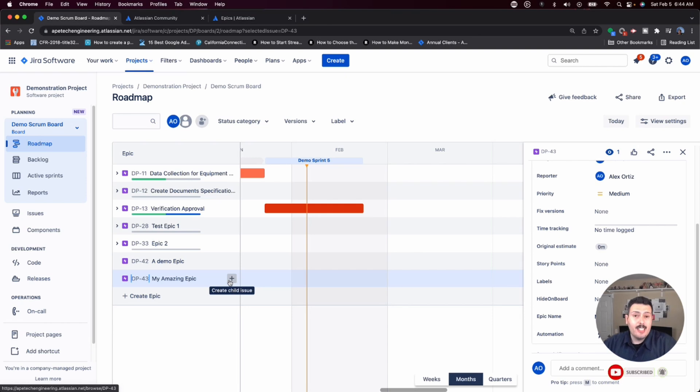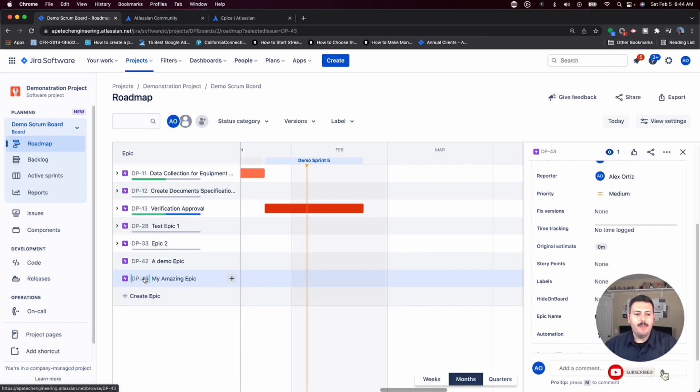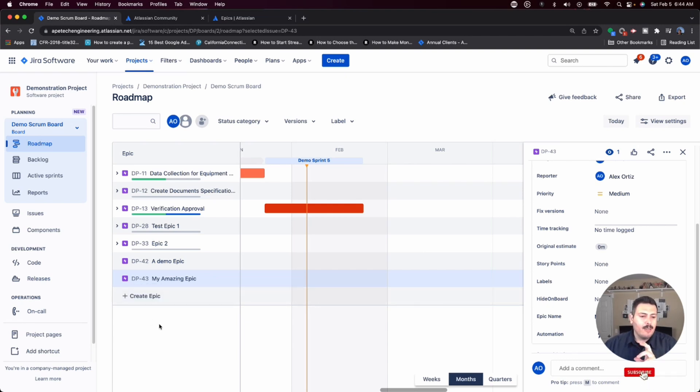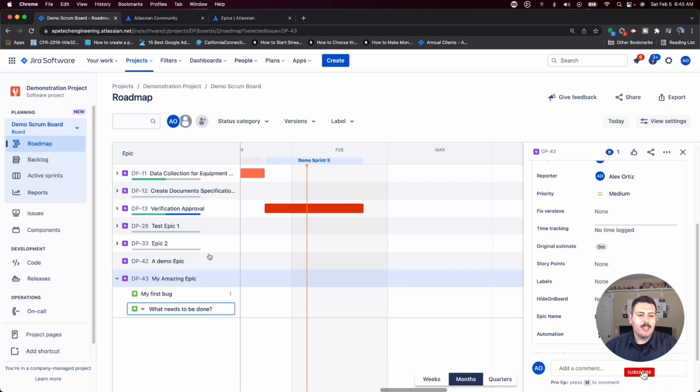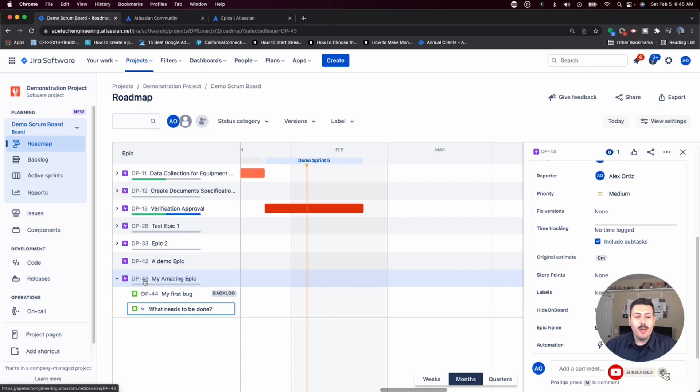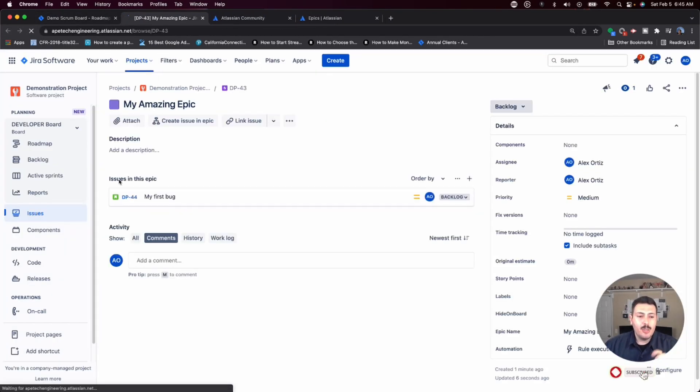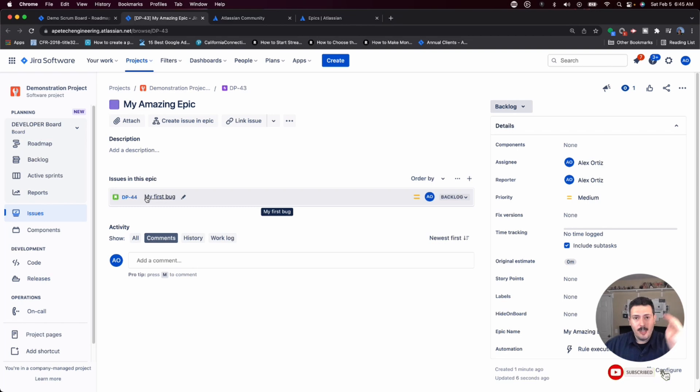And while you're here, we're going to basically transition to the next phase here, which is how do we associate stories to an epic? So let's take a look at that in order to associate stories to an epic. There's three ways. Okay. One is within this roadmap view, since we're already here, you can click the little plus sign and you can actually pick whether you want to a task or a bug or a story, whatever issue types are available to you. I only have stories and bugs. So I'm just going to create my first bug and I'll click enter. And now when I open up, so I'm actually going to directly open the epic. You're going to notice that there's issues in this epic and my first story is now in here. So that's the first way.